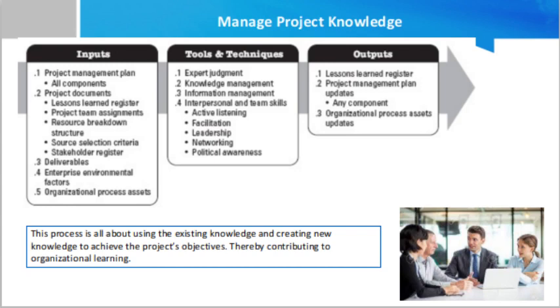It helps the current project by helping the project team take corrective action in real time to improve the performance of the project, and secondly it helps future projects by creating a lessons learned register which can capture and share the knowledge gained with the organization at large.